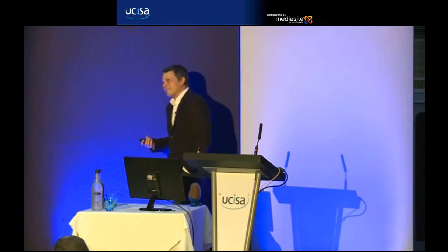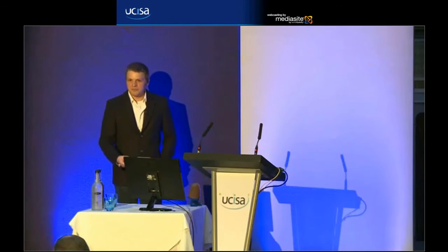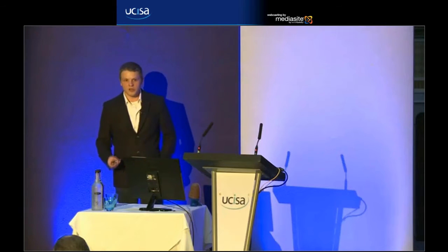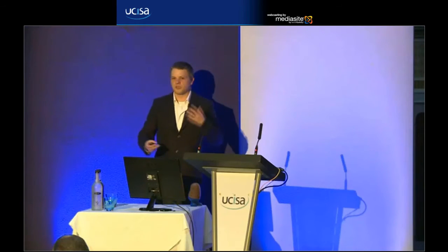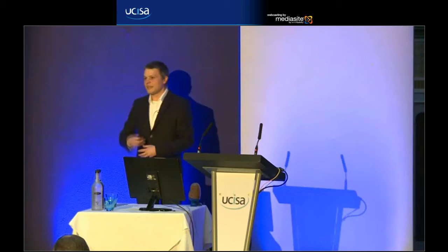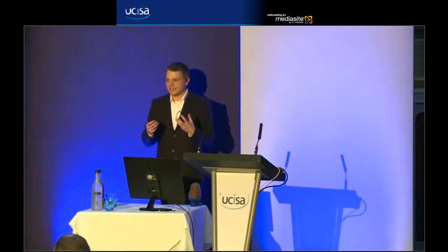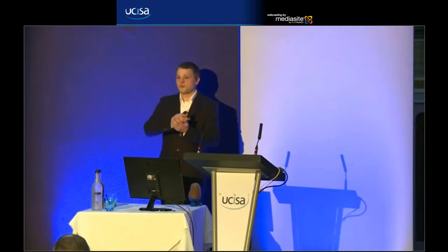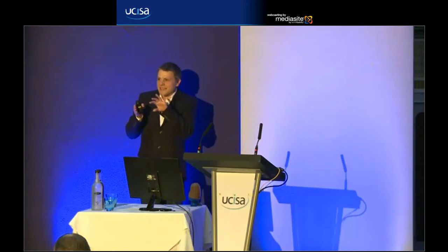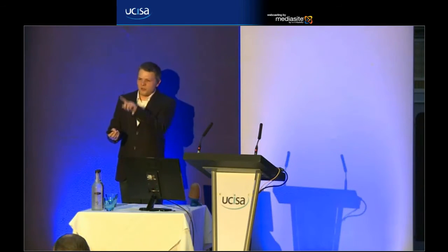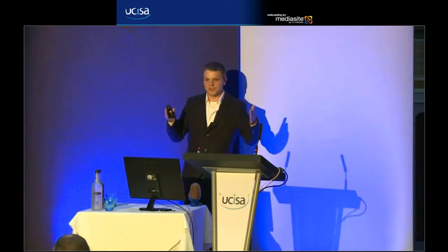And communication is vital. So this is communication between the team, but it's communication with the customers and the users all the way through the sprint. So we're working with them, we're showing them things that we've developed, we're getting feedback from them, because at the end of the iteration, the testing bit is not there to define the requirements. What you don't want to do is do lots of work like a mini waterfall where you do all this work in isolation, deliver it to the customer, and they say, well, that's not quite how I want it. And so you have to use the next iteration to fix things. What you want to do is work within that 3-week period to get out all the problems and work with the customer closely.